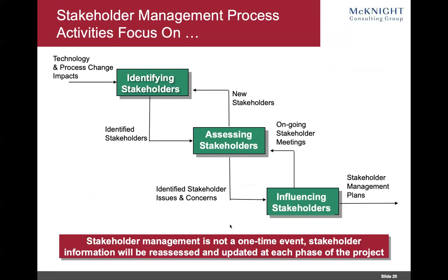Stakeholder management: identifying your stakeholders, assessing your stakeholders, and influencing the stakeholders. Many times we're talking about stakeholders that are VP level or above — when that's the case, you influence them on an individual basis. You are not creating a one-size-fits-all plan for the CEO and the COO. You have to take into account their personality and their understanding. This is not a one-time event — it must be reassessed.